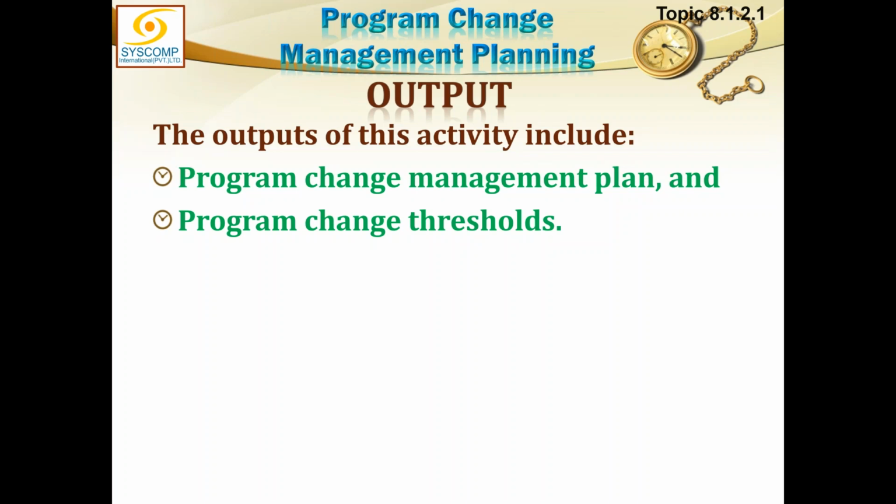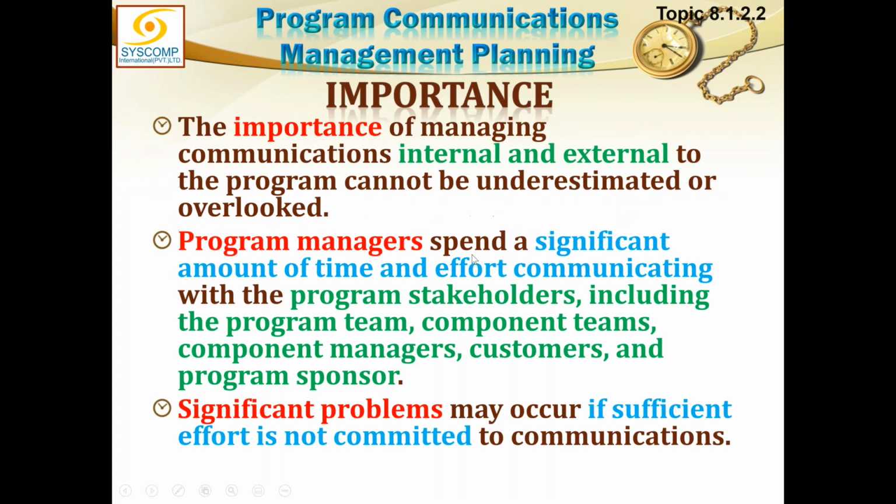How much is change? So this is the change threshold. If there is a very minor change, you may define already that this much change will not apply the change management plan. This much change is within the power of maybe the component manager or program manager or whomsoever. So that much we can absorb. That defines your program change threshold.